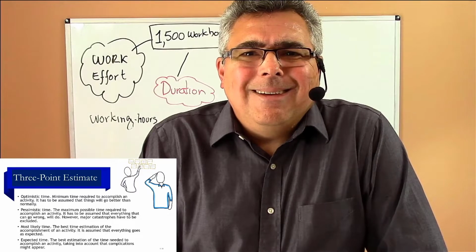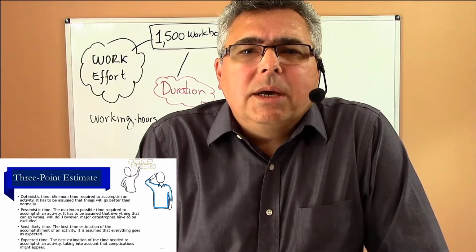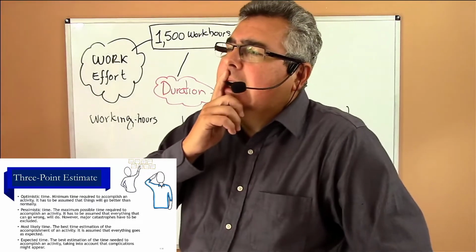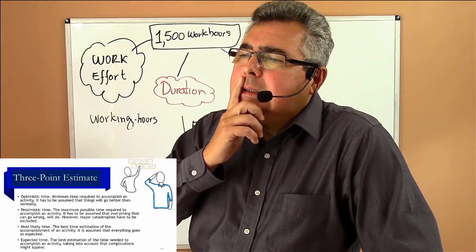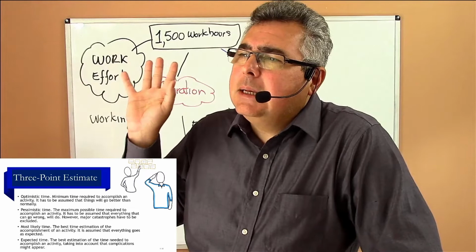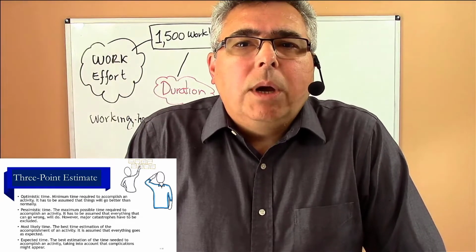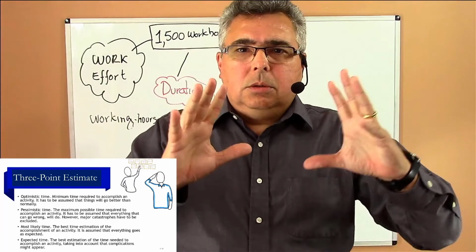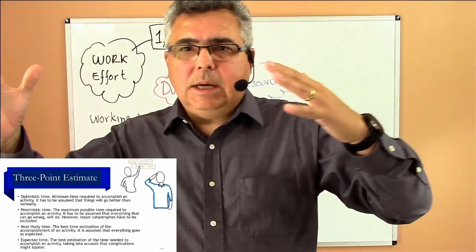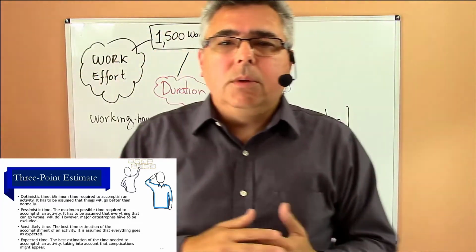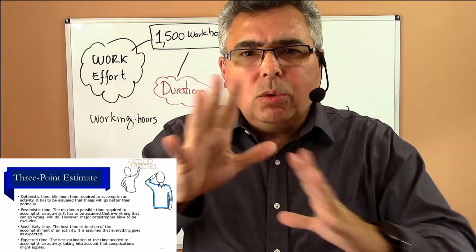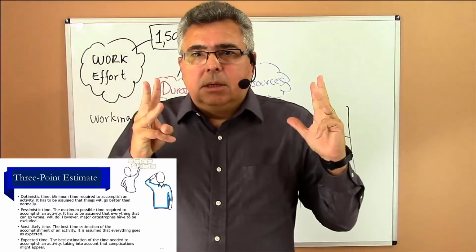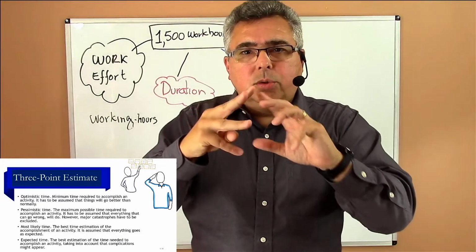And then I ask, okay, and which one took the longest to paint? And the guy can say, oh, let me see, oh, that one there was very complicated. That house had some water leak in some place. So the worst was 12 days. And so we push the person that provides the estimate to go from one side to another, so you help him to analyze the situation. And then we say, okay, and for this house, what do you think is a good number? 5 days.